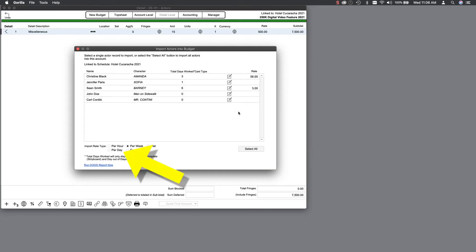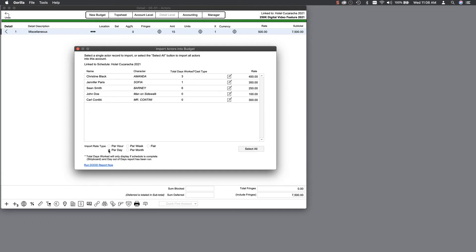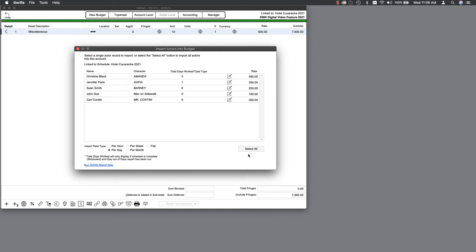Select Per Day for the import rate type, and you will see the daily rates entered for actors for the linked schedule. If one is empty or you want to modify a rate, you can edit it from here by selecting the Edit button. The total days worked will appear here in this column based on the Day Out of Days report, which is based on the strip board in your schedule for the default board selected.